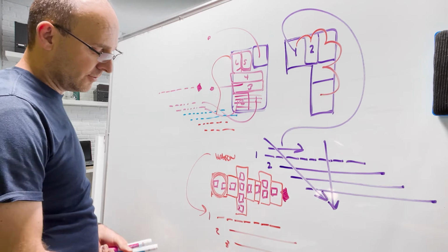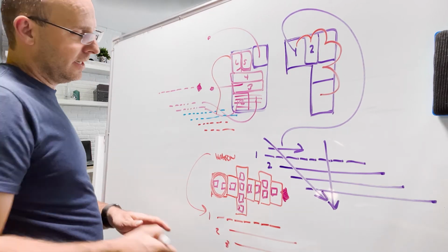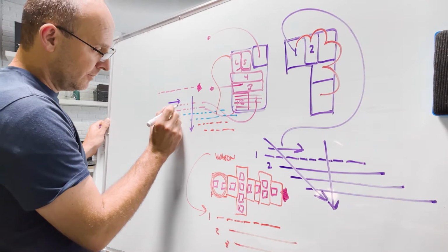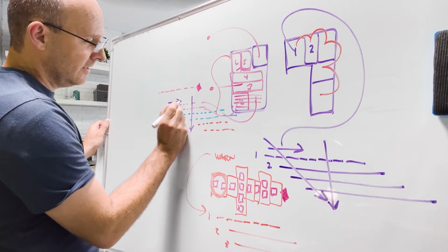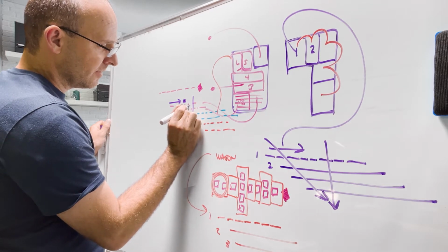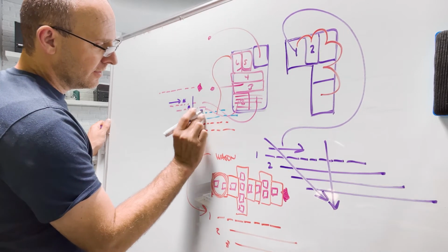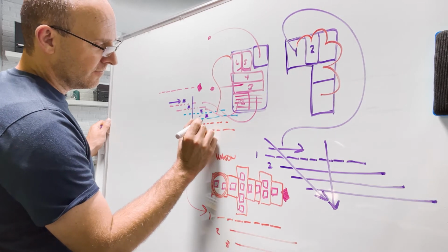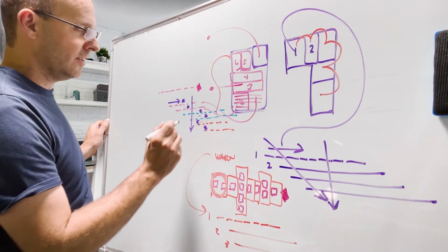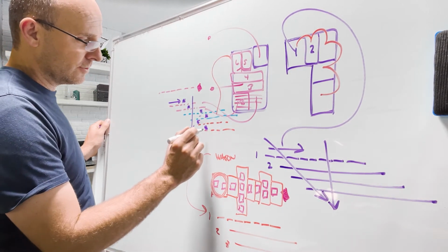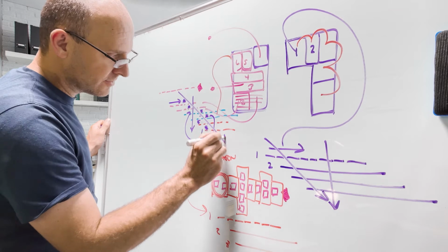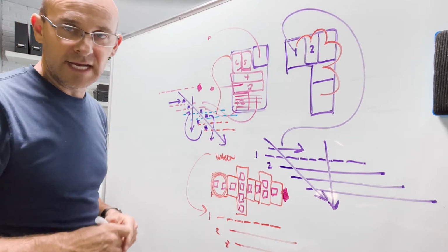You can still come through here and analyze not only the flow of work in each area and the logistical flow this way, but you can start to see if you have takt wagon number 5, and then the 5s are over here. Well, you want flow this way as well, so should you move these reds up in the sequence and move these down so that you have a nice trade flow as well? So really, takt planning applies everywhere.